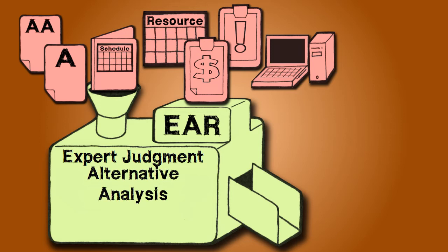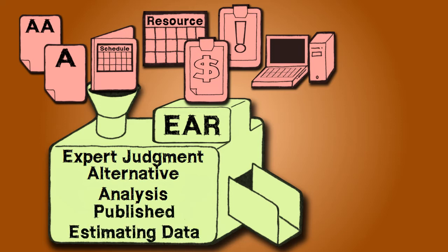Many projects can use information based on standard resources used in their industry. This published estimating data is industry-specific information that's typically published in trade journals, websites, publications, or periodicals. Project managers can utilize this information to help accurately estimate the resources they can assign to activities, based on how it's done throughout the rest of the industry.